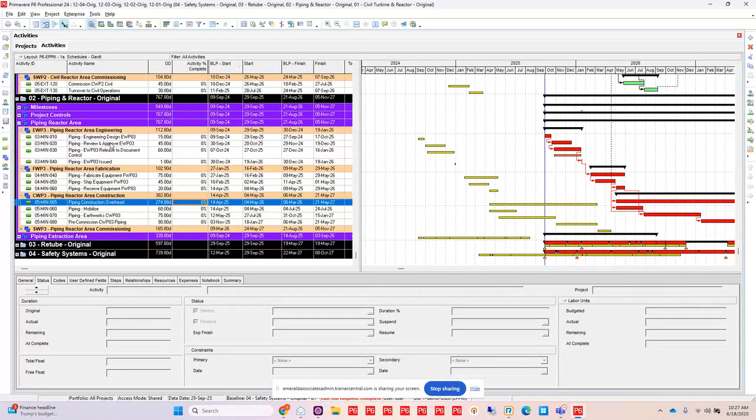You have to get it done in 20 days because that's what your commitment is. And if you're not going to be able to meet that commitment, perhaps you need to hire more people to get it done, because you had to deliver it within those 20 days. So you can set up those different types of activities that you have there.